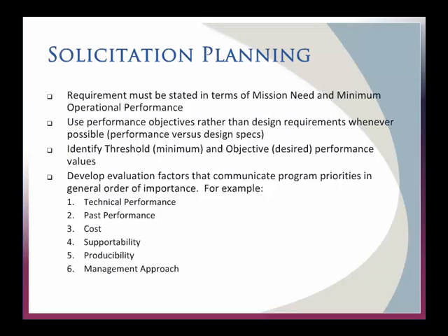So a few words on your solicitation planning. Now that you know what you're going to do, you got to have your mission need, your operational performance. You got to set all the stuff up front. Remember, you have to tell a proposal writer what he's writing against. You can't just leave that open. So technical performance, you're interested in past performance, cost, supportability, producibility, the management. I might ask a company to tell me how they're going to manage. How are you going to be organized to execute on this? You have a right to ask all those things.